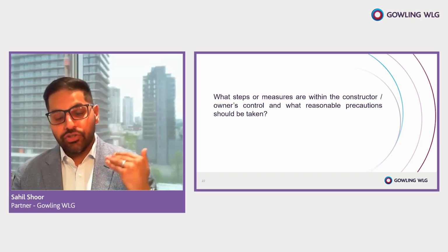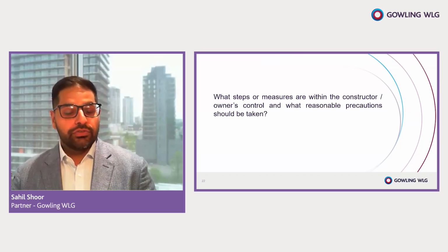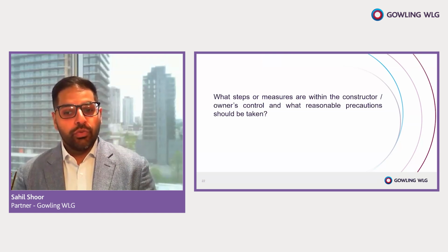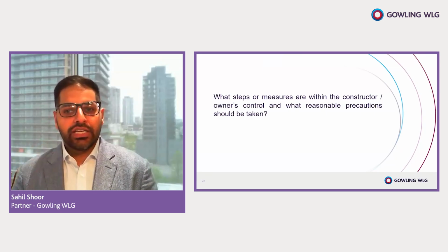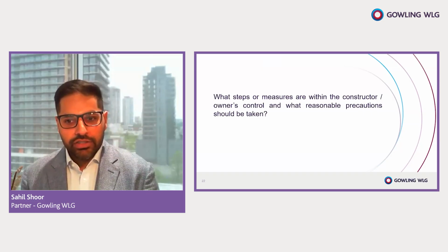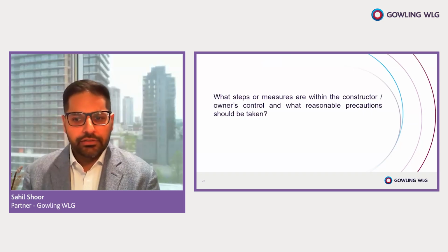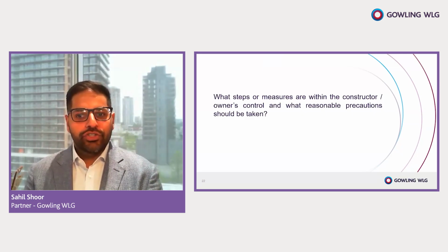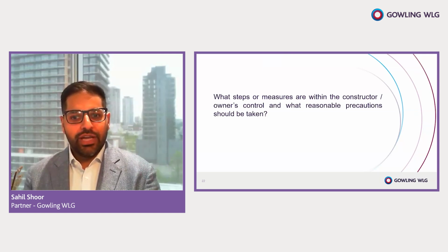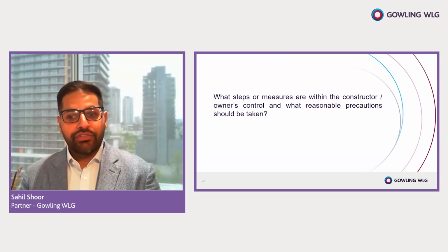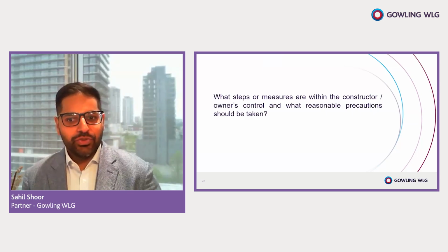That's the very beginning, so that you will be able to point out that once you get the project going, your role as an owner and employer is not that. And that's what is very clear in the decision as well, as to what are you doing on the project? How involved are you? So I think before even looking at the contract, looking right from the outset really assists. And it's quite clear to me, having done the work both for owners and contractors, and Tushar, you and Michael could verify, that you are not expected to be on site every day running this project. In fact, the more you're trying to run the project, the more likely the ministry is going to turn around and say, actually, you have taken over the role of a constructor, as you've interfered with the contractor's ability to perform its role as a constructor, and therefore you have taken on those liabilities. But that doesn't also mean you can turn a blind eye to it.